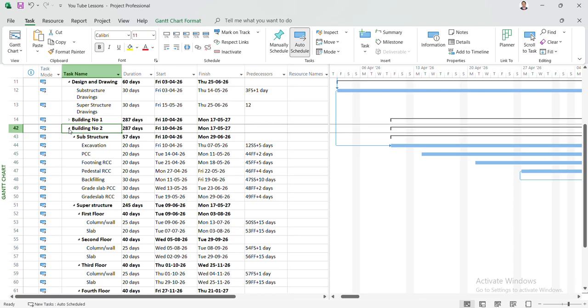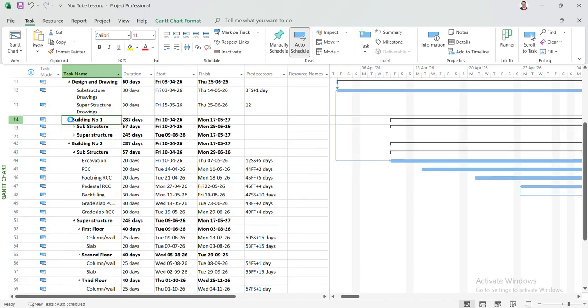So in this, what is the first activity? It is my excavation, the first activity. All other activity links are already changed. Only excavation is the first activity, and this activity is linked to another WBS, outside of this main WBS. So only that one we have to change. If any other activity is linked to an activity of another WBS outside, then we have to change. Otherwise, within that WBS, all the predecessors are already changed. So I have to change the excavation only.